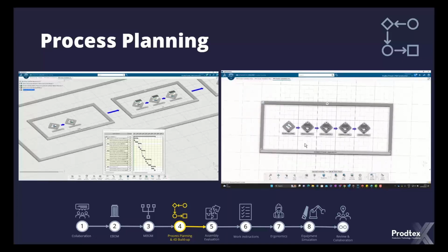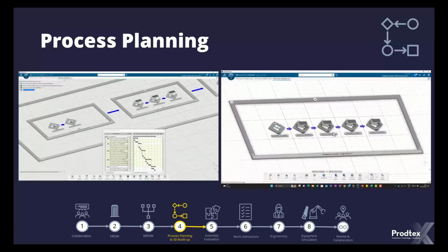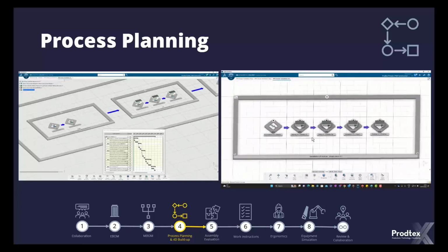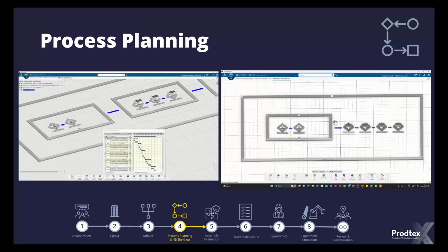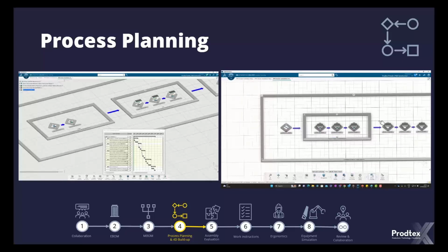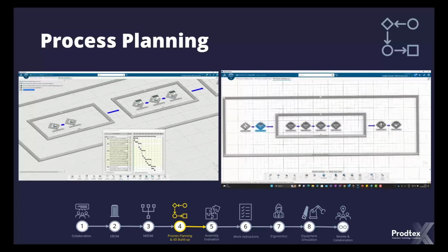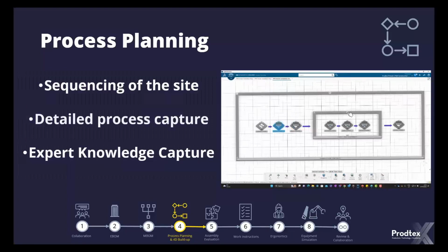And we can take this as high level as we want. If we only know the very big steps of it arrives to site, it's going to get lifted into position, it's going to be installed, it's going to be checked. Or we can go super granular as well if we have that detail of install this bolt, install this nut, shim this area, if we know that sort of information. If not, that's okay, we can find that out through the stuff that Callum will show you in a moment too. So yeah, so that's the process.